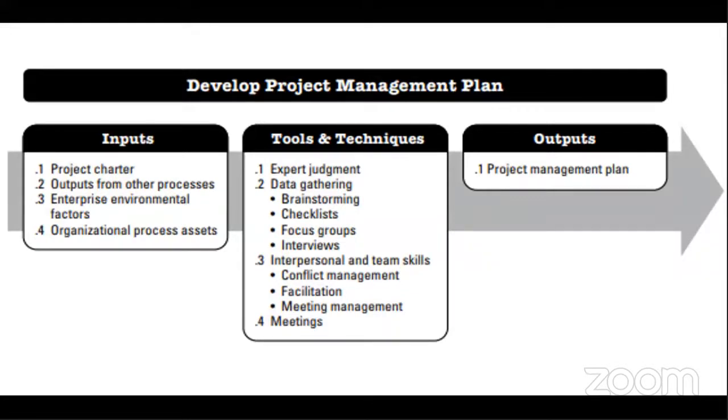One of the major sources of those updates are the assumptions we made, those uncertainties that we foresaw and documented, and as the project continues, they can come up as changes. So we need to have a change request form and a change log, where we can categorically say what changed in this project and how it was integrated back into the project plan, for easy documentation and review. It makes review and evaluation easy. Then at the end of the day, we'll have the project management plan as the output of developing the project management plan.